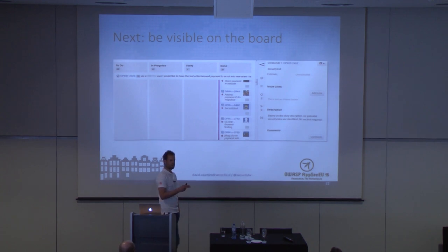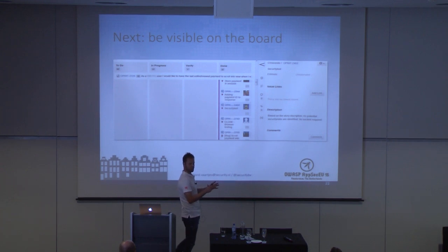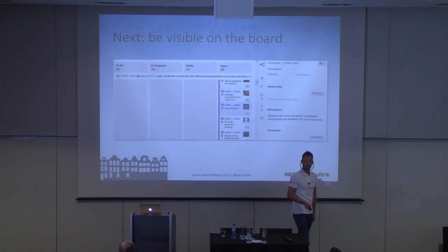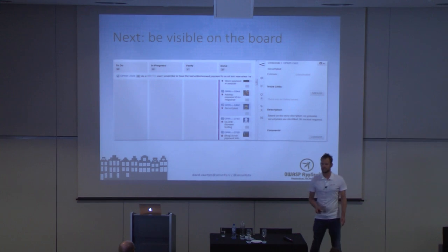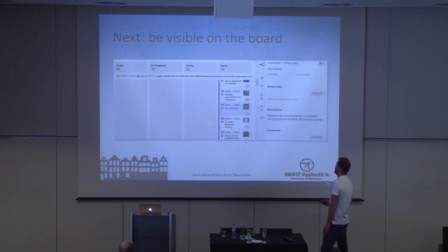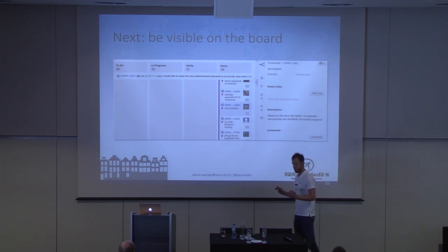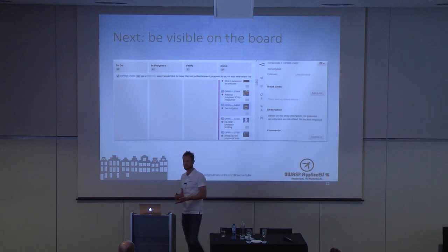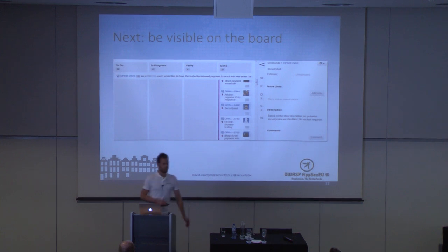So we were really trying to get as much assurance as possible from code reviews, because this is really efficient. If you need to set up all your tooling, wait for environments which are not stable, and agree on time slices, then time is spent really fast. So we only did this if we really needed it. And if we added such a hands-on test case, we also put in there what our requirements were, what we needed, which test data, and when we needed it. And this worked pretty great.